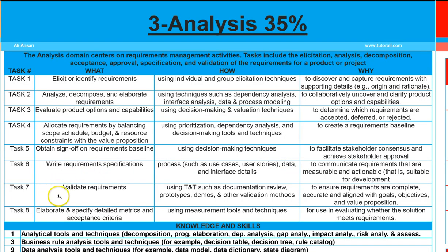The next one is validating these requirements using tools and techniques such as documentation review, prototypes, demos, and other validation methods. And why do we do that? Is to ensure requirements are complete, accurate, and aligned with goals, objectives, and value proposition.